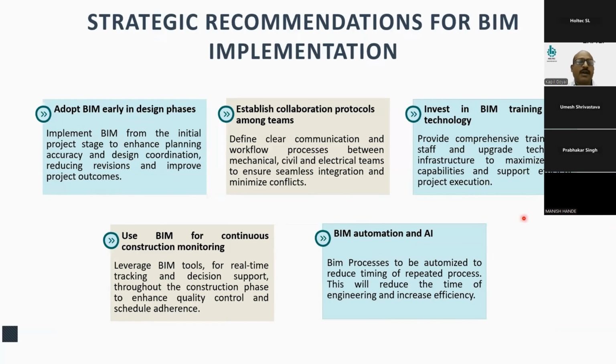There are some strategic recommendations for BIM implementation. If somebody chooses to have BIM, then these recommendations are very helpful. We should adopt BIM in the early phase of design. See, certain people are thinking of adopting BIM at a later stage: let us prepare 2D drawings conventionally, then we'll prepare a BIM model or a digital twin. So you are not able to fully utilize BIM and get all the benefits which you might have got while using BIM from the starting phase.